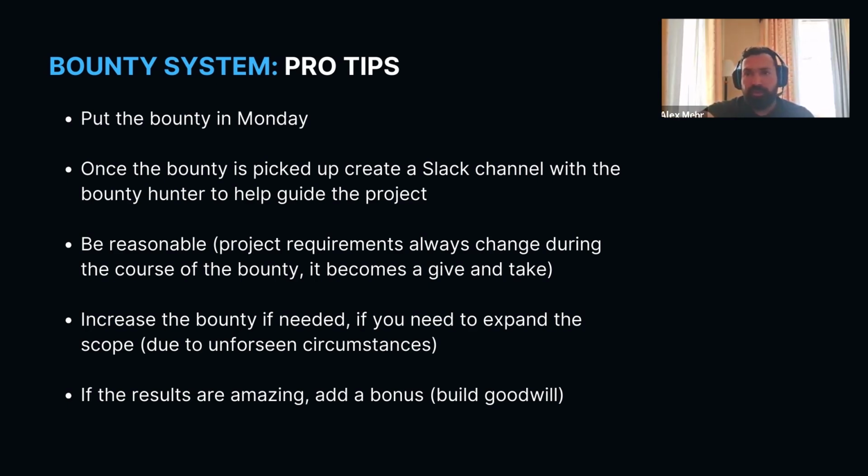Okay, I see one question. Is the bounty the fee or the project itself? It's the payment that you pay to the engineer once the product is delivered. And sometimes, in some scenarios, you have to put a deposit up front and the rest becomes the bounty. Okay. I prefer, obviously, all of it is backloaded, because then the engineer is fully motivated.